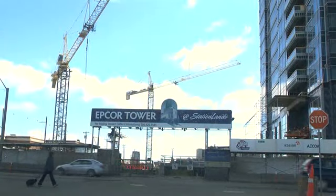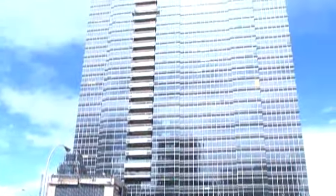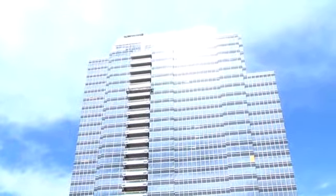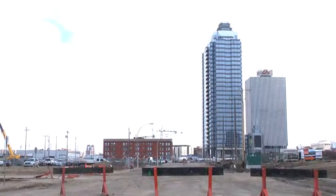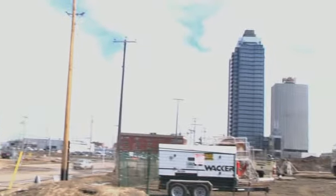One of the major challenges popped up back in 2008 when we were doing the planning for it, and there was an announcement of a new office tower going up, the EPCOR Tower, which is right on top of the alignment of the tunnel coming out from Churchill Station up towards MacEwan Station. We very quickly had to secure financing and work together with the EPCOR Tower project team to get the LRT tunnel integrated into the foundation of that building.